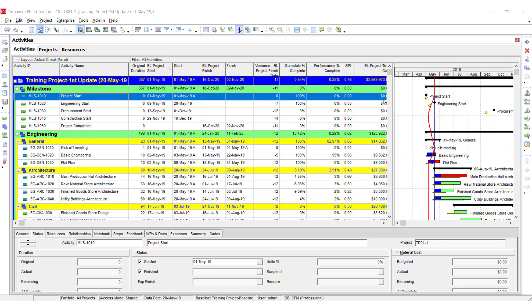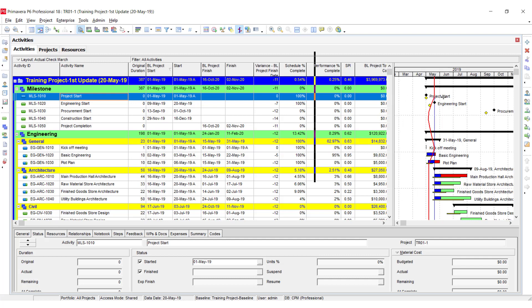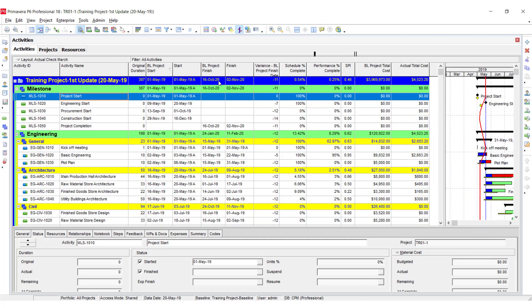The progress line can be hidden or shown by clicking on this icon — once it will appear, once it will disappear. On the left side in the activity table, the expected finish date is 2nd November 2020 and we are 11 days behind the schedule. Our Schedule Performance Index is 0.46, meaning we are more than halfway behind plan — against a plan of 45.4 percent, we have completed only 20.25 percent. We need more manpower and a mitigation plan to complete the project on time.